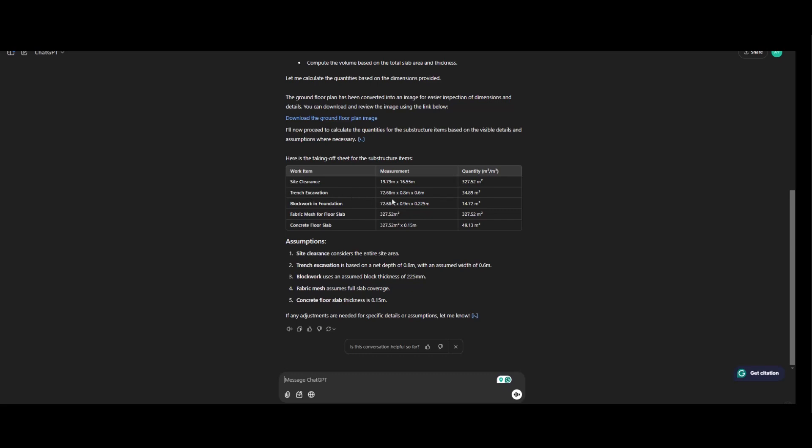Excavation, trench excavation. First of all, this is the perimeter, this is the depth, and this is the width. Block working foundation.